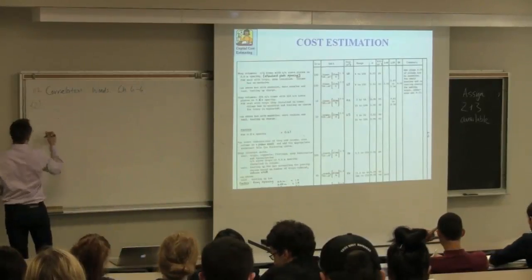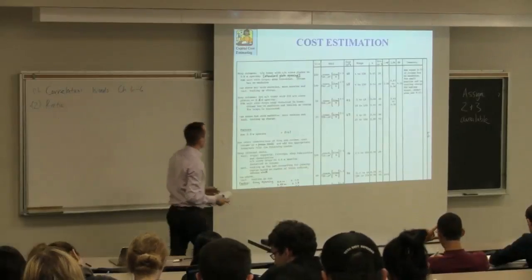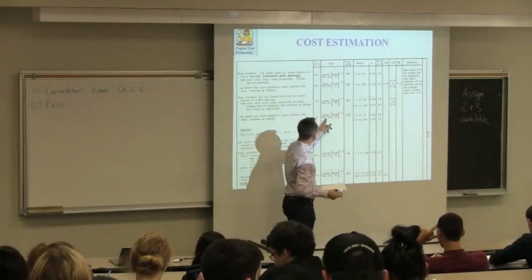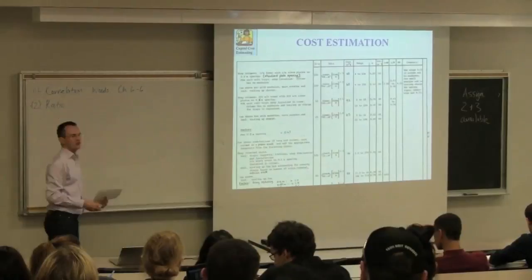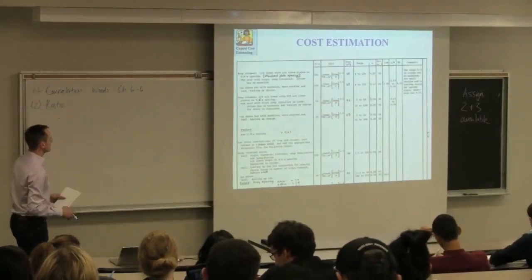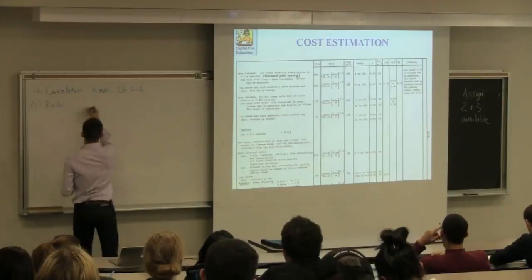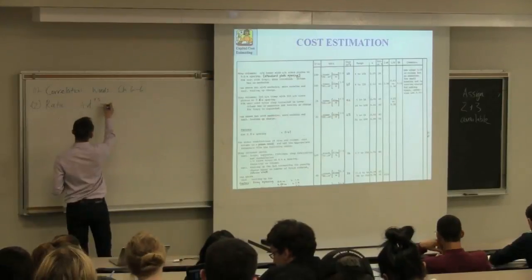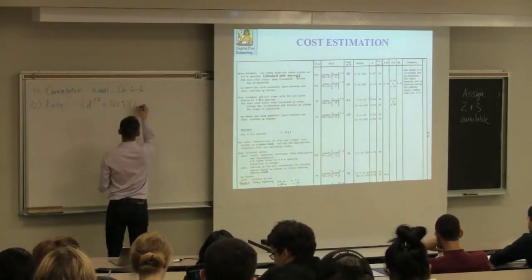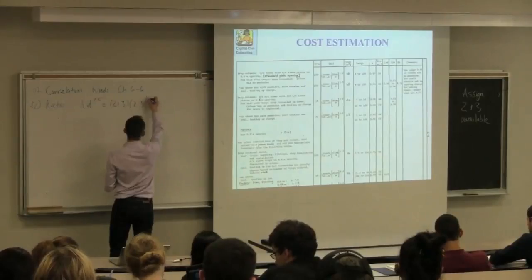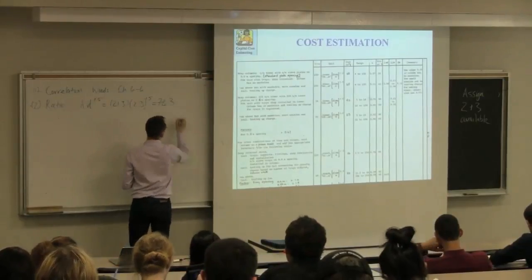Next we check if this correlation is valid. The way we specify this column is given by the height of the column multiplied by the diameter raised to the 1.5. This is a little bit unusual, which is why I wanted you to look at this one. So for this ratio, height times diameter raised to 1.5 is 21.3 multiplied by the 2.3 meter diameter tower raised to the power of 1.5. And that gets us a value of 74.3.